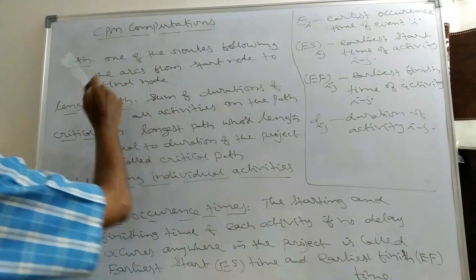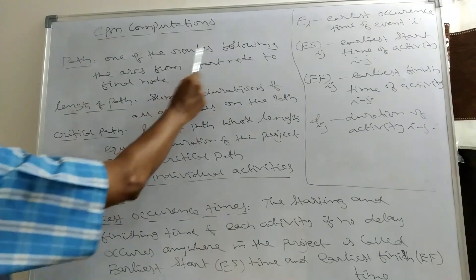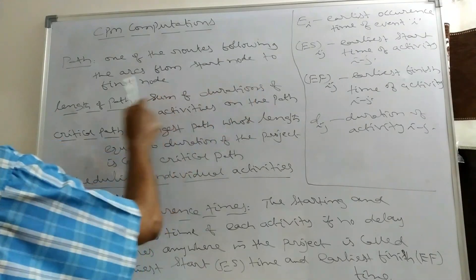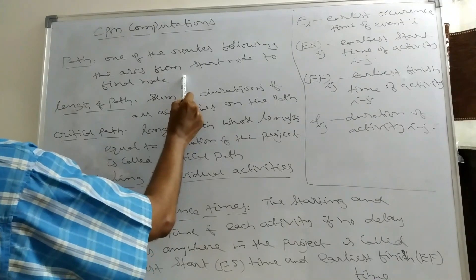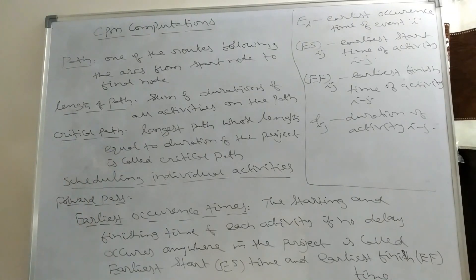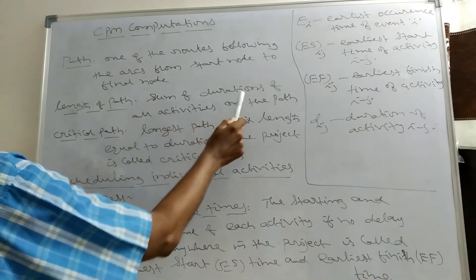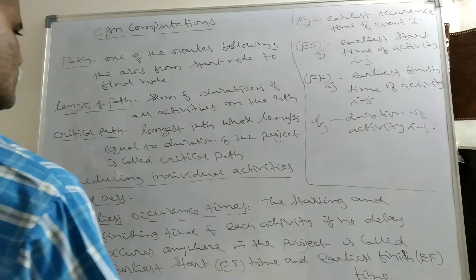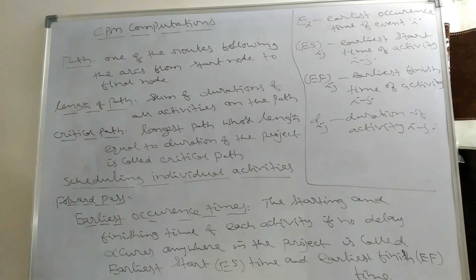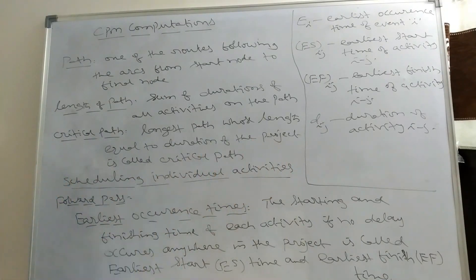Next: CPM computations. A path is one of the routes following some arcs from the start node to the final node. The length of a path is the sum of durations of all activities on that path. A critical path is the longest path, whose length equals the duration of the project.